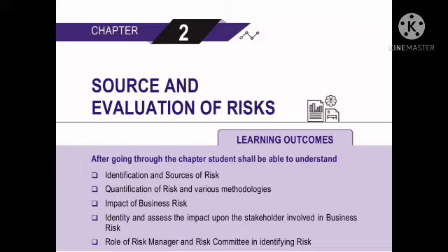H. Decision tree is a diagram that depicts key interactions among decisions and associated chance events as they are understood by the decision maker. The branches of the tree represent either decisions, shown as boxes, or chance events, shown as circles. I. Expert judgment can often be applied in lieu of or in addition to the mathematical techniques described above. For example, risk events could be described as having a high, medium, or low probability of occurrence and a severe, moderate, or limited impact.